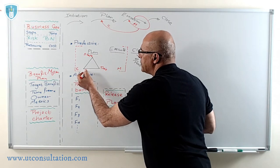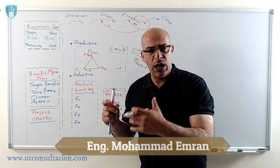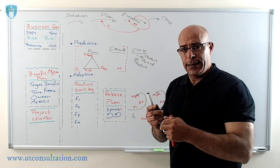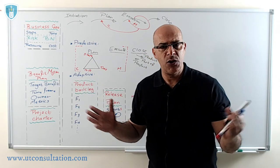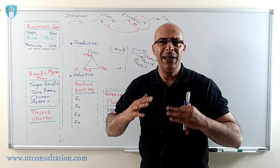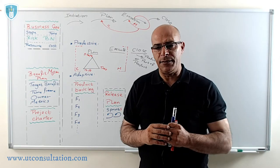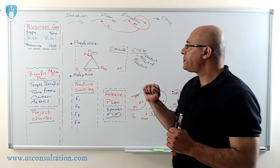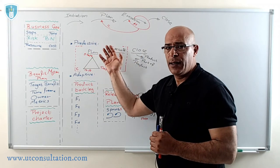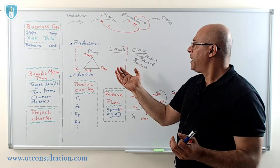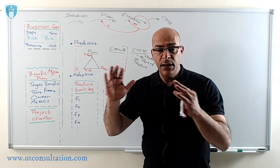The planning stage takes roughly 20% of the project time. In planning, we try to define the scope baseline, time, and cost. Once they become baselines, everything is measured accordingly. Any change to scope baseline, time, or cost does not happen randomly — it goes through a change control system. The process becomes very restricted because the plan is well-defined and predefined and agreed upon. After plan then execute, monitor and control during those phases, if all goes well, we close — and there is a handover of the product or part of the product. That is the predictive life cycle.